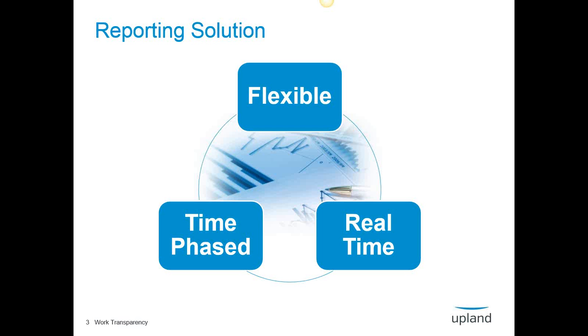And the way it does that time phase part is it takes a snapshot each day. So you can set it up so that every day at a certain time, and it can do it every day or every week or every month depending on what type of report you're trying to create. It'll basically just take a picture of the system, of what data was in the system at that time, and then when you're creating the report you can show how that data has changed over time. So all in all, the reporting solution just helps you to create the reports that you need to create easier.